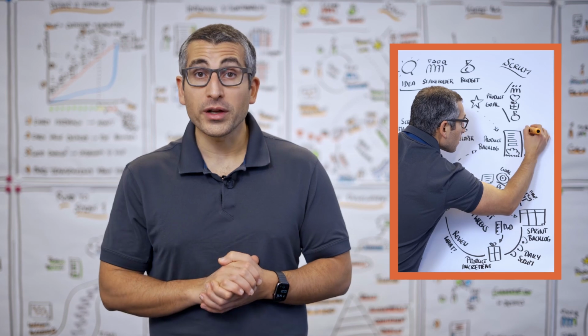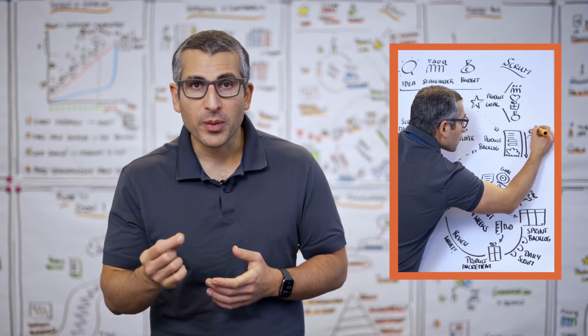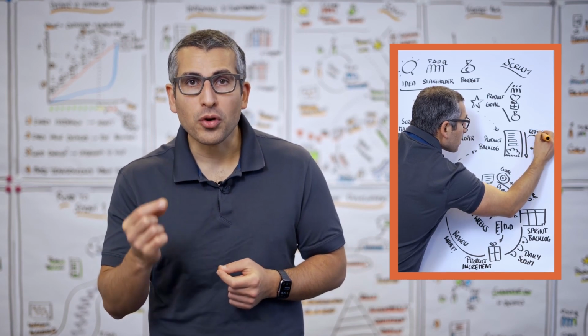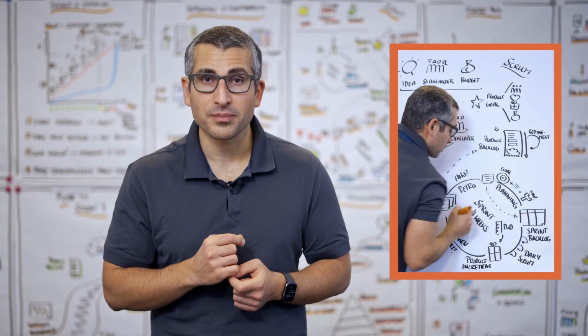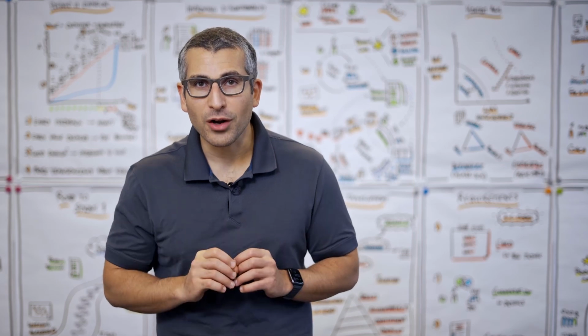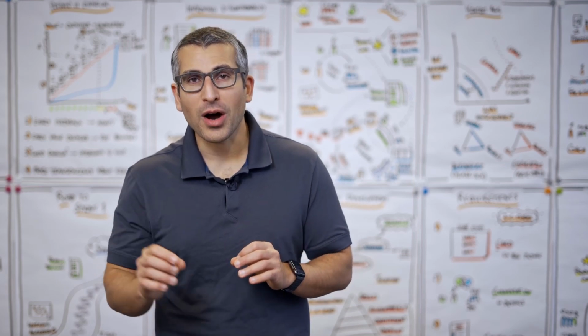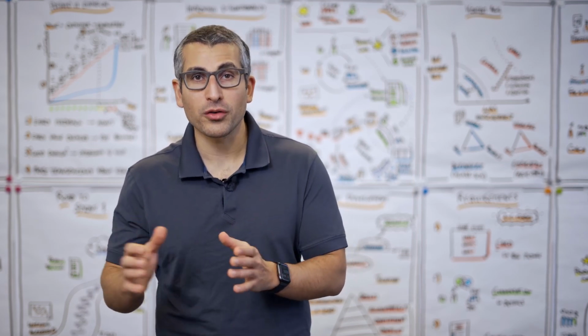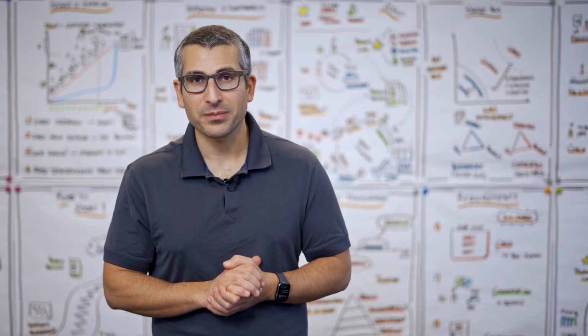In order to avoid this dilemma, we do frequent and regular product backlog refinements, which means we try to create a product backlog that is ready for sprint planning while we're working on the current items in our sprint backlog. That product backlog refinement happens throughout the delivery phase of our current sprint.